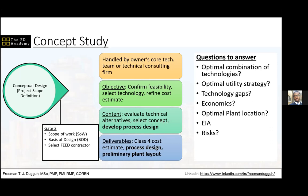You look at the risk of the facility, the risk of the project in general. How you're going to be impacting the environment, how the environment is going to be impacting the project, the market of the plant location, the country where the plant is going to be. You consider all of the risks. Is it a stable government? Do they have political crisis all the time? Is that going to affect your project? Do they have terrorists, kidnappers, various kinds of considerations? All of that is done here.